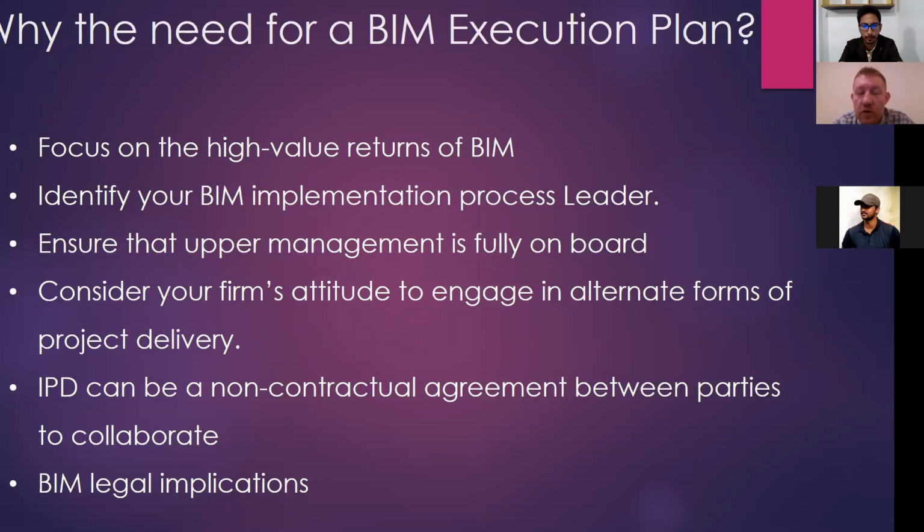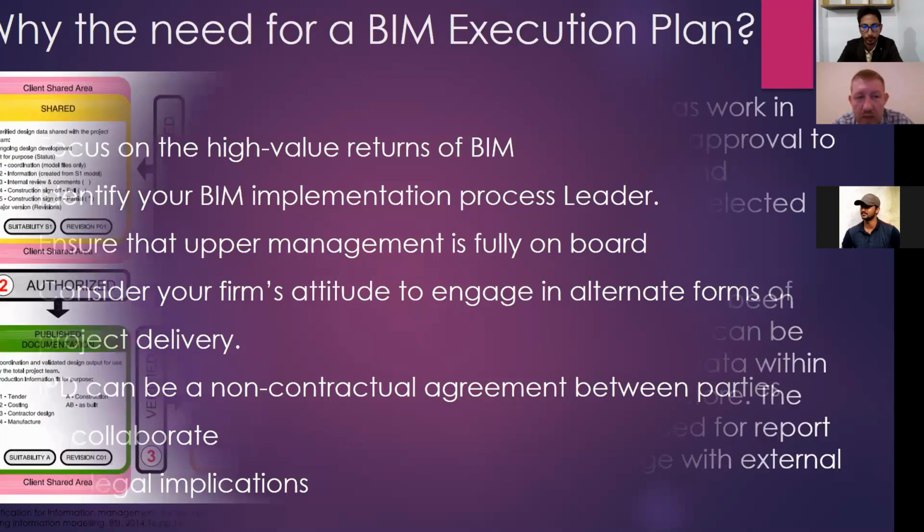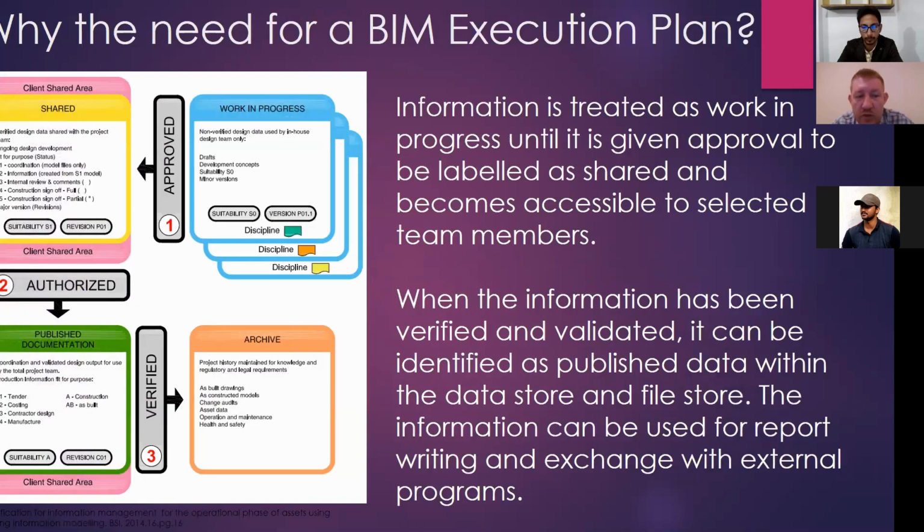Also, you have to identify who is your BIM process leader. So in every firm, there will be somebody that is the process leader that will lead this BIM execution plan. And from the owner's perspective, he will have to have a BIM execution leader that will lead the whole project. So all these are part of this work in progress, shared, published, and archived.